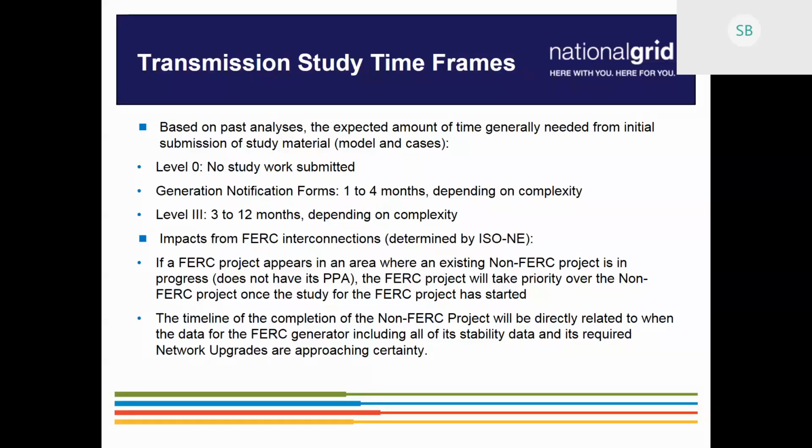Hi. Are you considering issuing conditional ISAs in parallel with the transmission study? Not until we know the results of the transmission study. Because fundamentally, the ISA won't give you the full cost of the project if we don't know if there's a transmission impact until the study is complete.